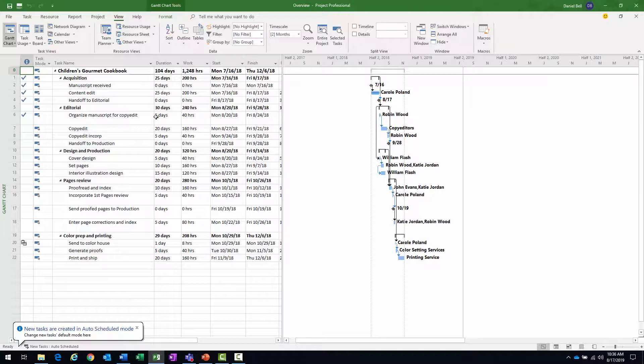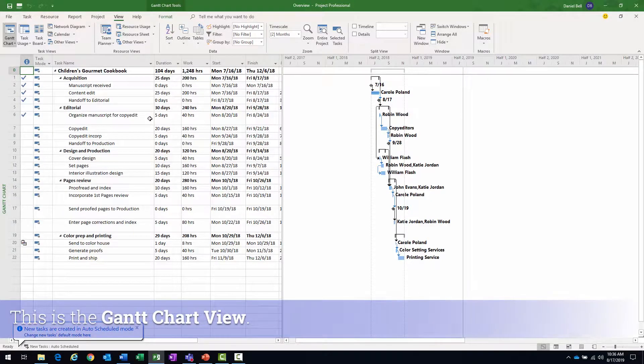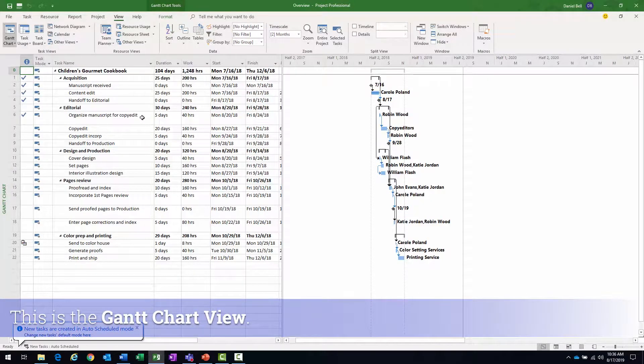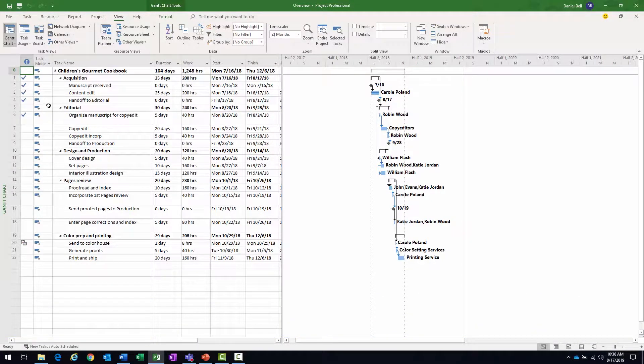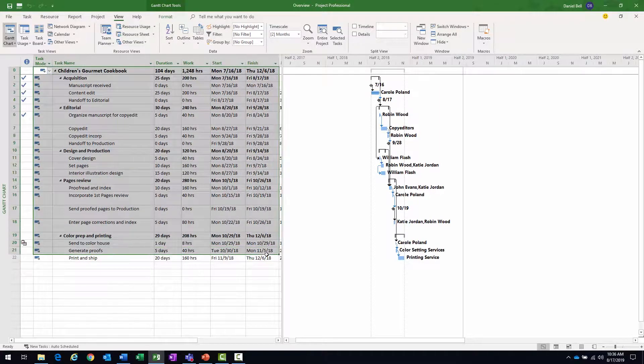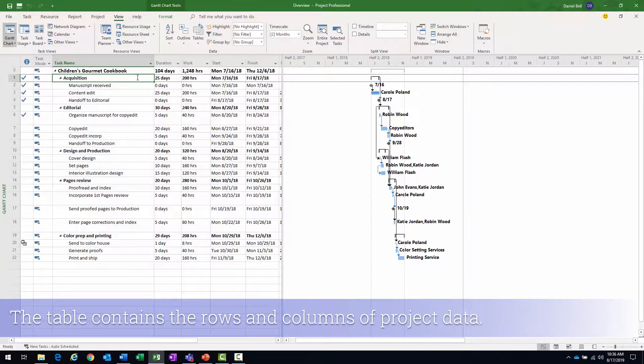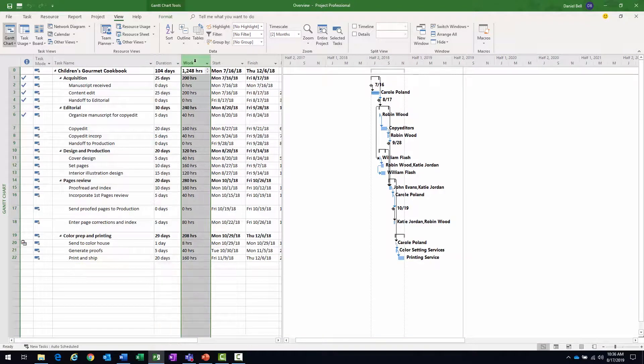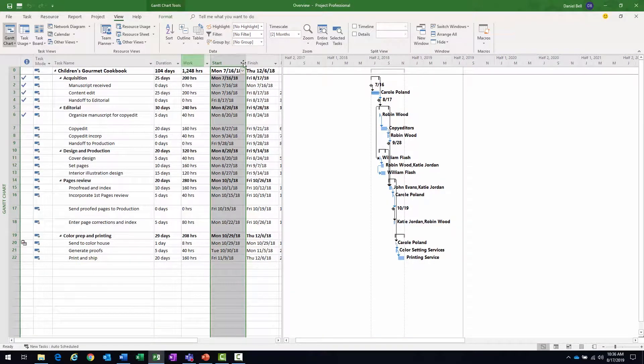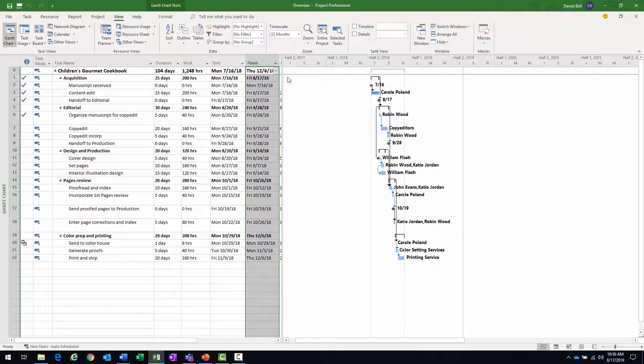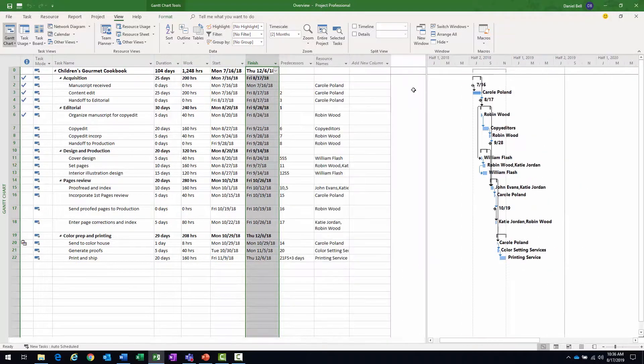So there's the Gantt chart view. It's a very common way to represent the project schedule. We have the table along the left. The table is going to have the rows and columns of the project data. You see the columns here: duration, work, start, finish, and if I move my divider bar over.